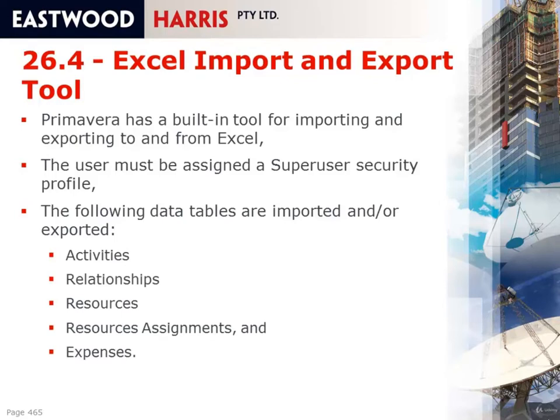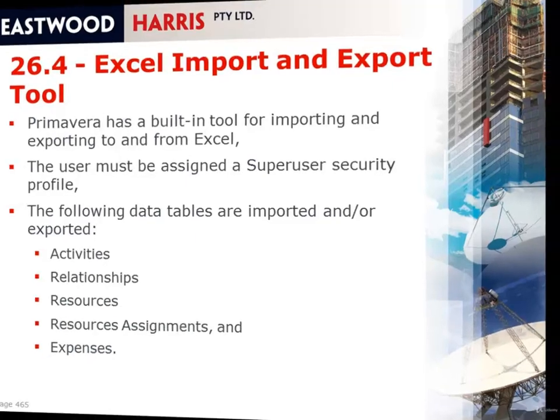Generally, as a principle, if I want to import data, I'll create one or two activities with all the data fields that I need to import, and I export them as an example. Then I populate the Excel spreadsheet, and then I can import the information. There are quite a few restrictions on what you can import into P6, but you can export most data. So let's have a look at how this operates.